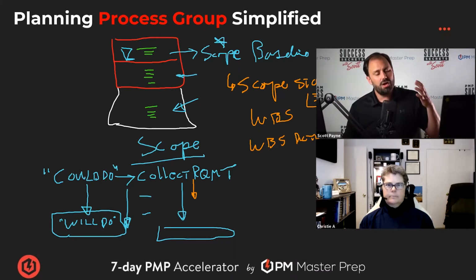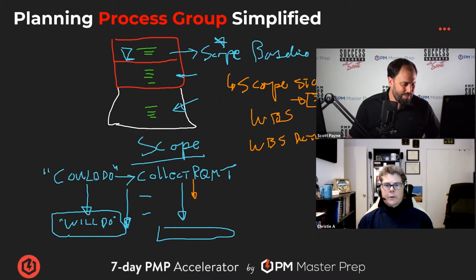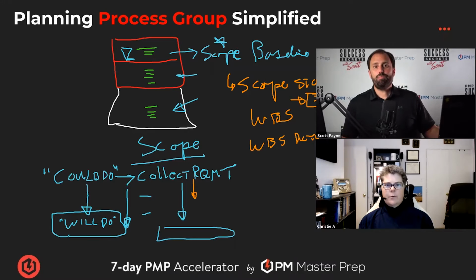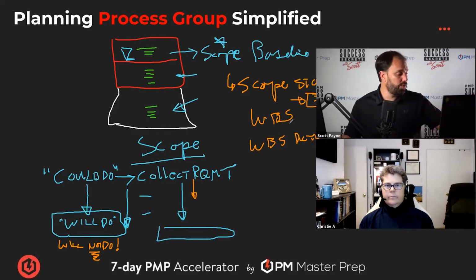All those things, so why would we do that? Why would we write it down in paragraph-ish form? Well, that's what manages your scope creep. Especially if you're saying we're not going to do granite countertops and somebody tries to throw that in, no, that's outside of the scope of the project. So it helps to manage that scope creep. Yes. So we're nailing down what we will and what we will not do.